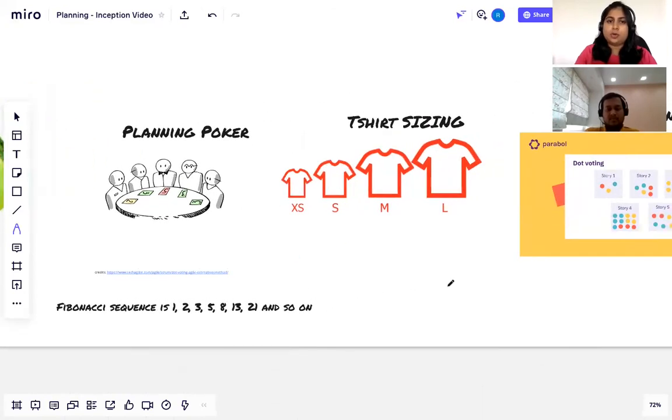Okay. So planning poker, a simple way to play it is you have a story up and then everyone has their own cards. You discuss the story as a team, and then you have a poker face and you say, on the count of 3, let's say how big or small it is. Everyone displays their cards. If cards are similar, great, but that is very rare. If I have to be honest, there usually are differences, which are good. So you pick the person who's given the lowest number and the person who's given the highest number, and let them discuss. Again, it's a matter of convincing or getting convinced.